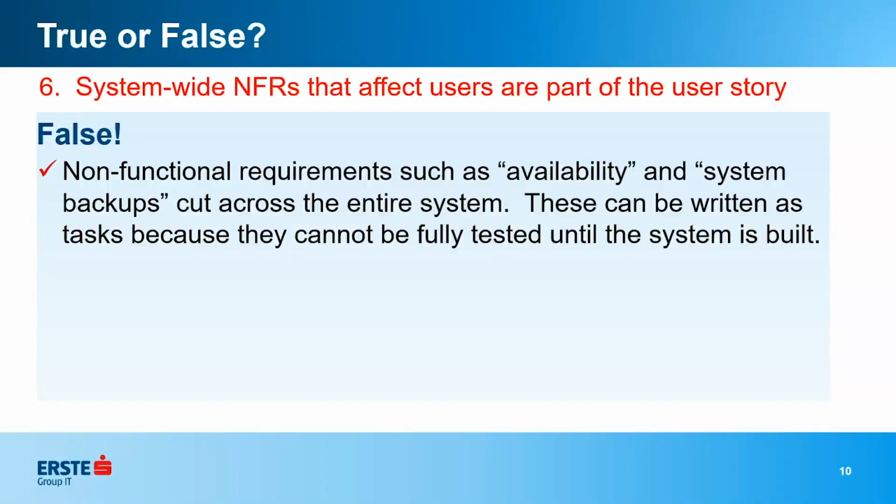If what you're working on may affect security or availability or accessibility, and another squad needs to test it, then I would communicate with that team and create a task for yourself to ask them to test it after the story is completed.